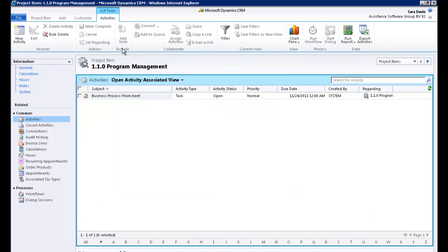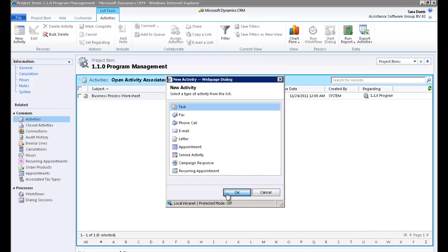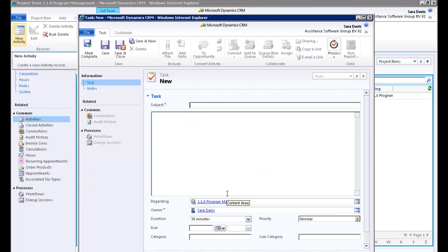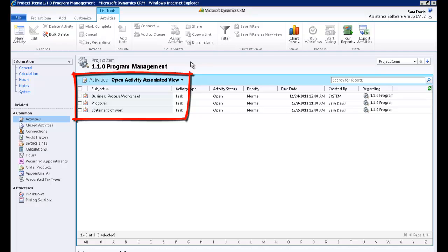You can also, of course, link additional project activities to this item. Simply hit the New button and follow the familiar steps of creating an activity. Whatever the number of deliverables in your project, Assistance PSA will help you manage these milestones by integrating them into your project breakdown structure. And because of the full integration with Outlook, the activities now displayed here will also appear in your Outlook calendar and task list.